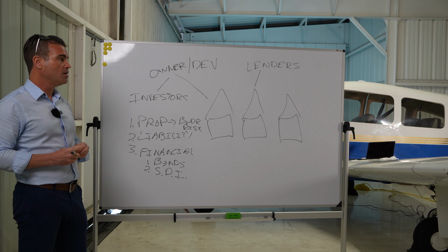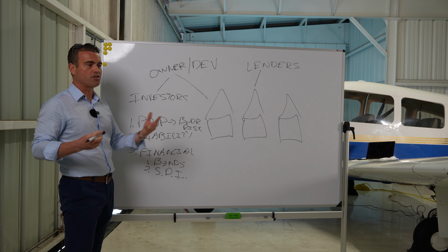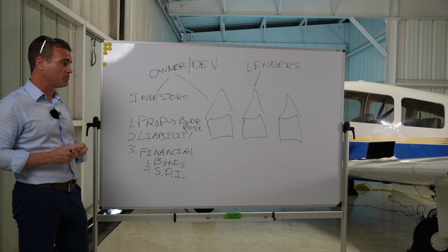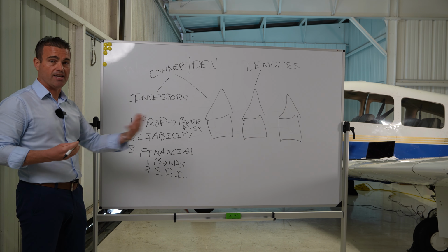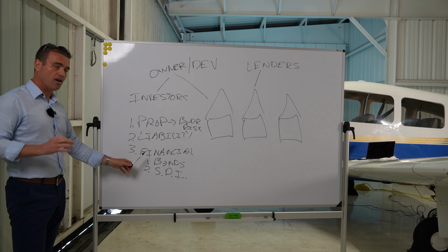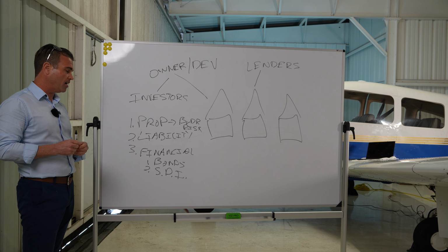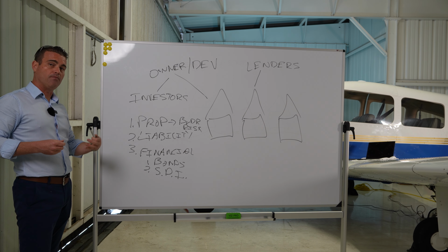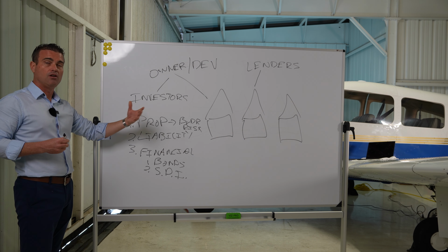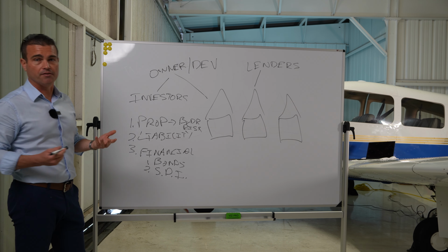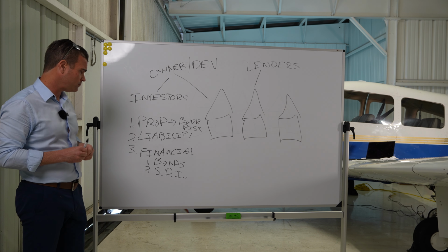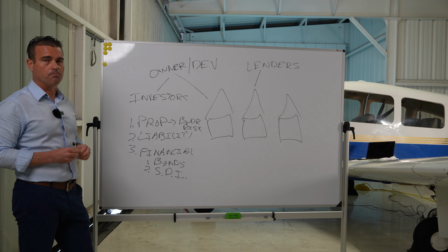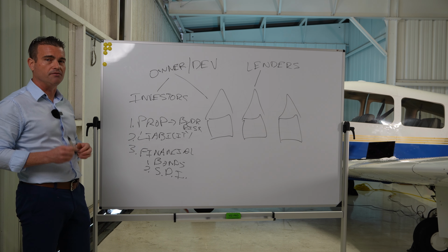What do you do, right? So you've already paid that electrical contractor. Of course, there's going to be some mechanisms in place there, but chances are you've already fronted some money to that electrical contractor, and now he can't perform, he can't complete the job. So on a typical payment and performance bond, they will provide a bond when they bid the project, right? And then they'll also provide a bond saying that they're going to complete the project per the terms of their scope and their proposal. Now, through the 2000s, construction payment performance bonds, because of the crash of the market, became very, very difficult, right?